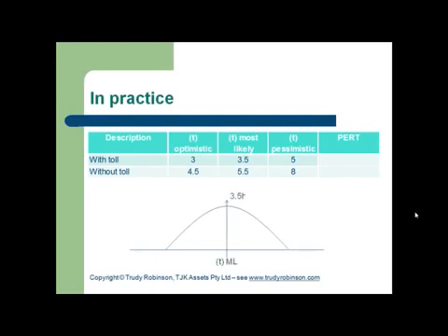In your mind's eye, you'll already understand that the most likely timeline is 3.5 hours. The pessimistic is 5 hours, and the optimistic is 3 hours. Having the mindsets that we do, we would look at the most likely timeline, but we would add a small amount to accommodate for extra stops, unknown circumstances, mechanical issues, etc. So we would usually take the most likely and add a small amount to give ourselves some leeway.